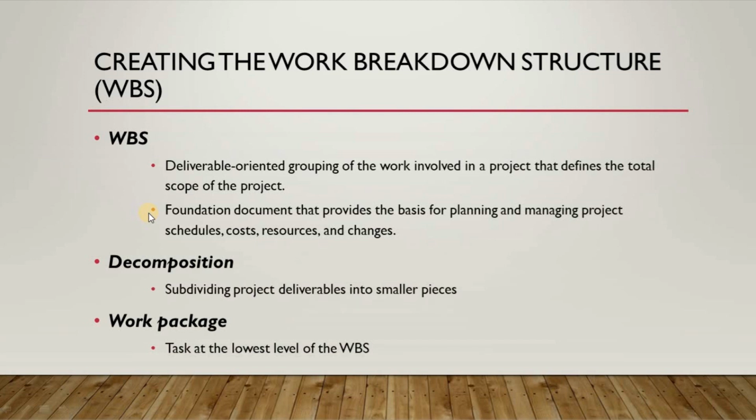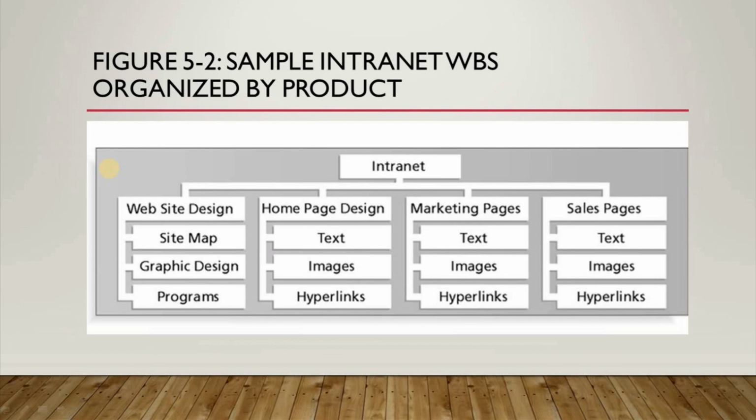The project management has to plan for the schedule, the fixed cost, the functional completeness of the project, and assign responsibilities. Decomposition: subdividing project deliverables into smaller pieces, work packages, and tasks at the lowest level of the WBS. Figure 5.2. Sample intranet work breakdown structure organized by product.